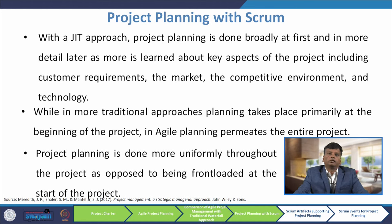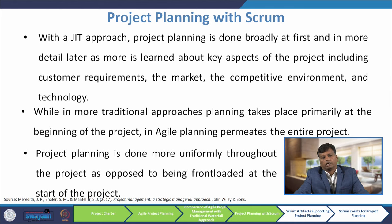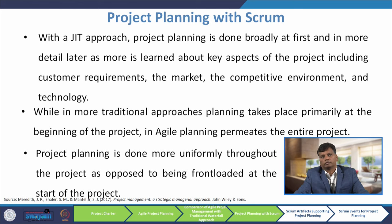The project planning is done broadly at first and in more detail later as more is learned about key aspects of the project, including customer requirements, the market, the competitive environment, and the technology. While in more traditional approaches planning takes place primarily at the beginning of the project, in agile planning permeates the entire project — done more uniformly throughout rather than being front-loaded at the start.